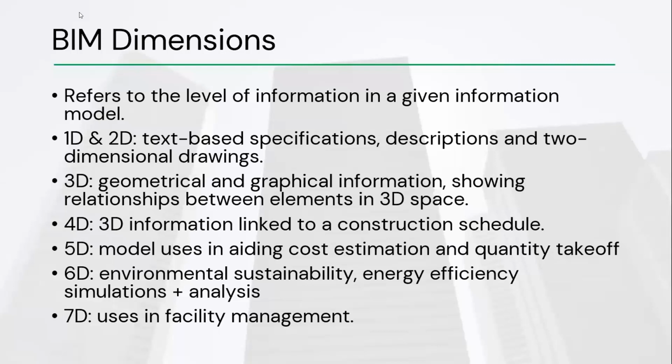With that, important facility management information, such as maybe manufacturer names for the components that you have, if it's electrical fittings and all that, plumbing fittings and fixtures. You have warranty information, maybe operational notes and manuals, product codes, technical specifications for all that, and any other facility management related information will be part of that 7D.